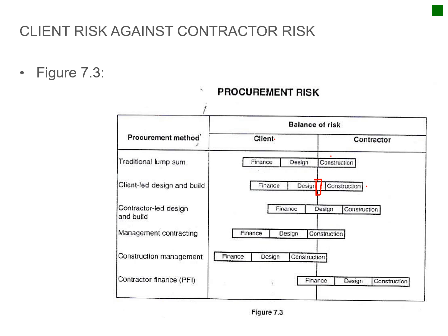And then you have a contractor-led design and build. So the client is still responsible for the finance, and then the appointment of the contractor, who actually appoints the rest of the project team. So you can see how the risk is shifted to the contractor.